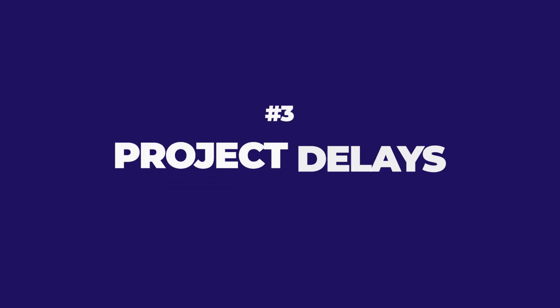Number three, oh my gosh, this is such a good video. Number three, project delays. Delays are going to happen. You're going to have an impact. You're going to have a weather event. You're going to have a missing piece of material. You're going to have a delayed piece of material or equipment or something on your project site, and you must know how to recover. The typical industry answer is rush, push, panic, more people, more overtime, more hours, more materials, more money, more work in progress. Those will only hurt your job.